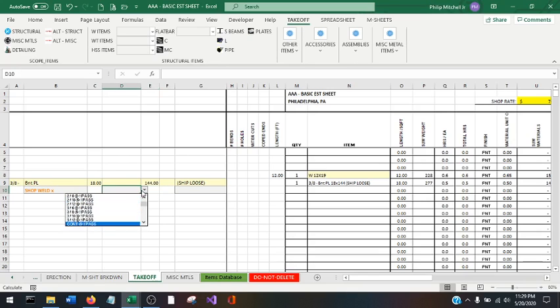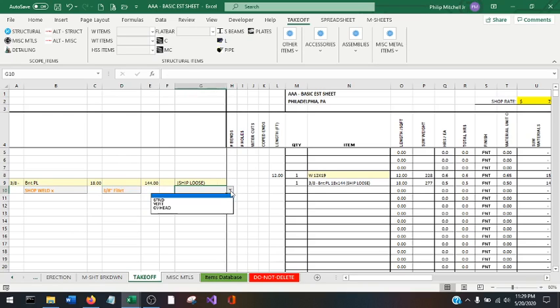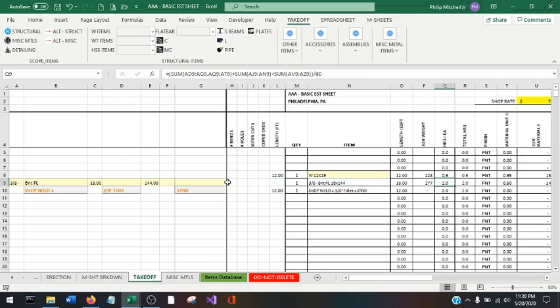Now here's all your different variations of your possible welds. I'm going to do a couple different options just so you can see how it works. For the 3/8 plate, I'm going to use the 3/8 fillet just for this video. It's 12 foot long and there's one piece. So this is basically a continuous weld. We got 2 hours of welding. If I chose this as being fit up and welded, it comes out to an hour and a half.